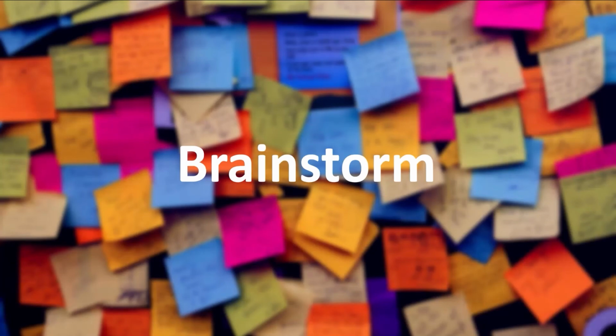The first step in building a risk register is to brainstorm what could go wrong. Involve as many different project partners and teams as possible to get different perspectives, and try and think of everything. Go as wide as you can.